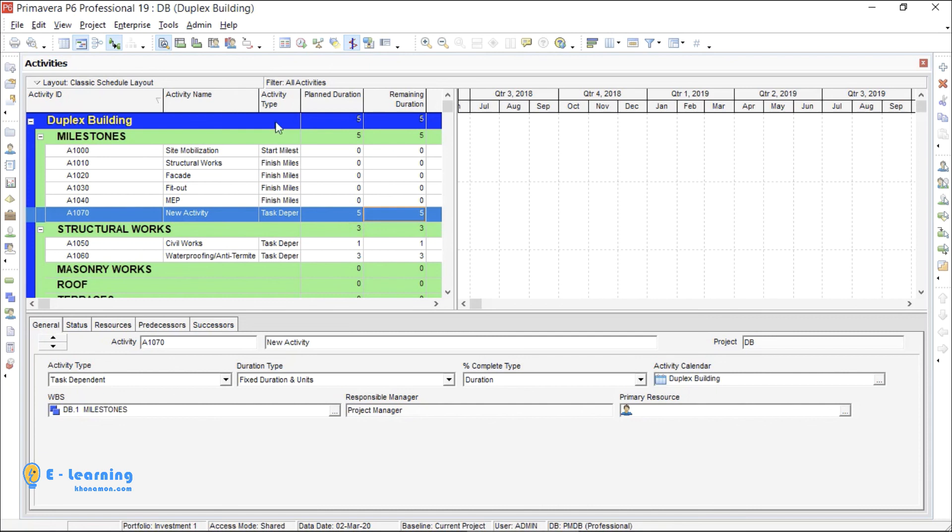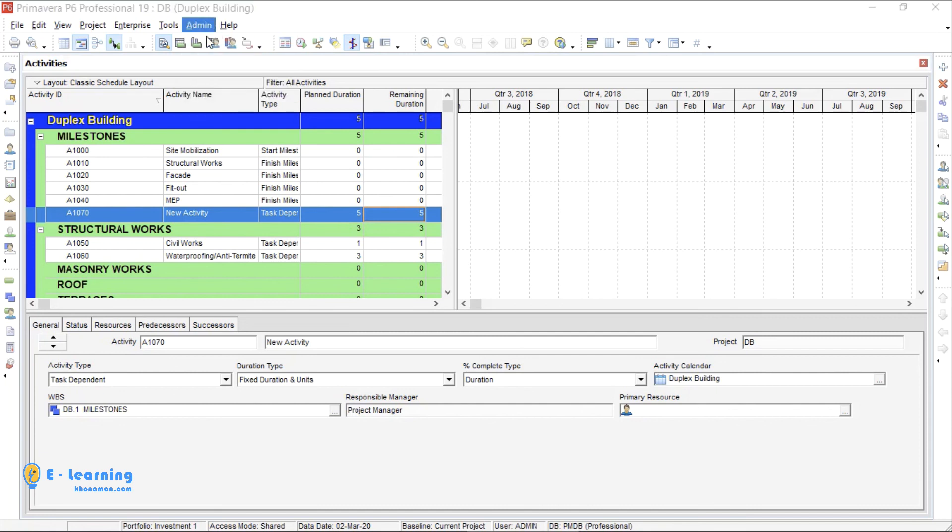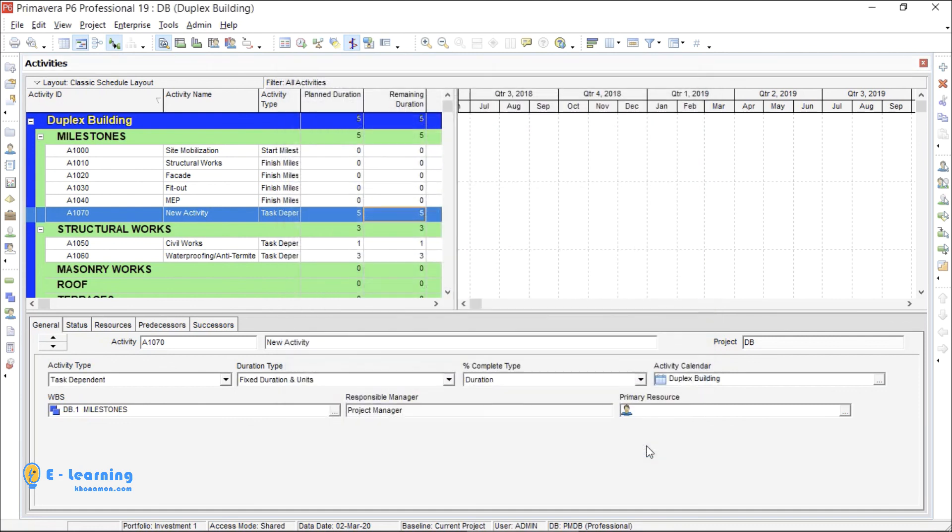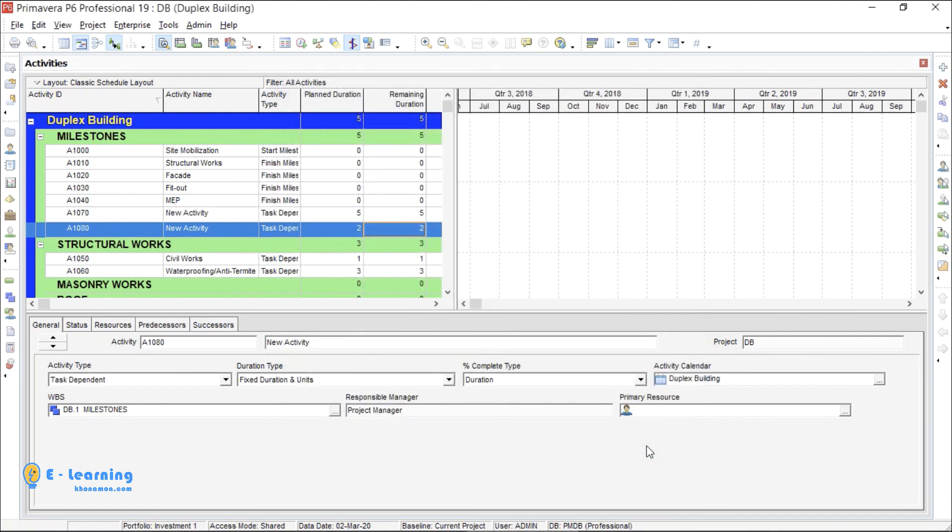Go to Admin, Admin Preferences. From Activity Duration, you can change it. I give 2, then close. When I create a new activity, you can see it is changed into 2.